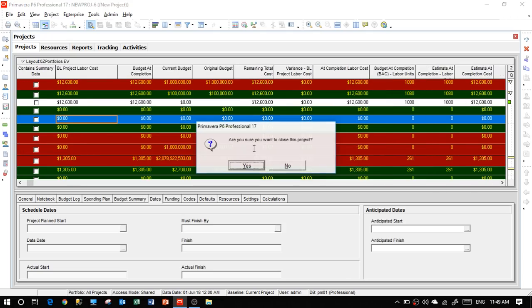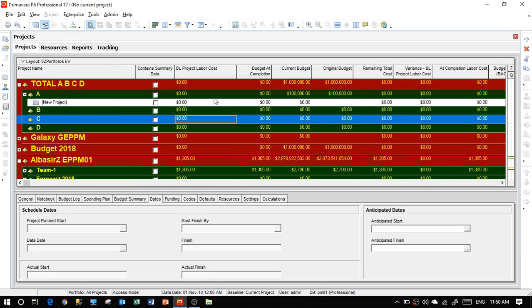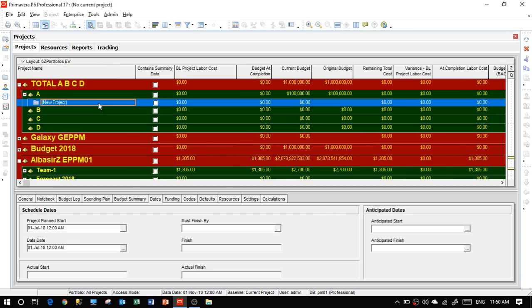Let us close the project and let's notice what impact there is when we close the project. See, some data disappears. Okay, so when you see this view, if you are reporting certain projects and you want to print it out, for example, you should open the projects to see everything. Otherwise, some of this data will not be there. Now, we notice that the baseline information is there, even though we didn't maintain it and we didn't assign it. And assigning and maintaining is to be sure that there is no change to the original baseline.